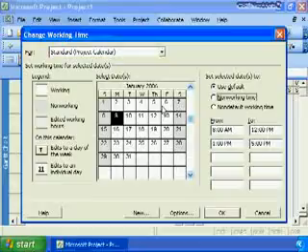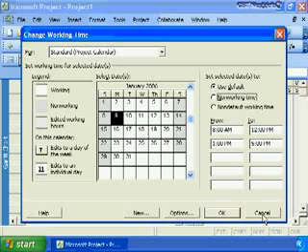But after that project is finished, you're going to start another project. And after that project is finished, you're going to start another project. So again, I would encourage you, when you first load Microsoft Project on your PC, go in and set the statutory holidays for 3 or 4 or 5 years hence, because you'll never remember to do it again, and you can get caught with embarrassing situations as I did once where I didn't set my statutory holidays.